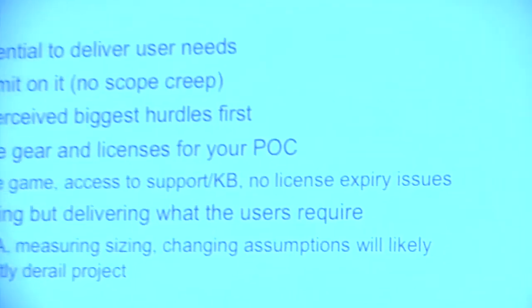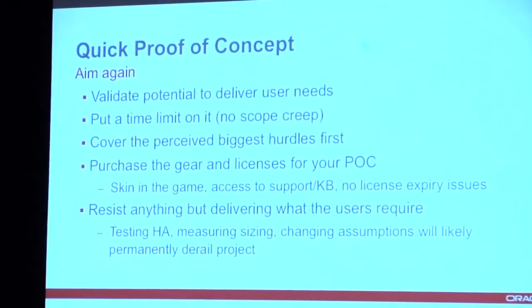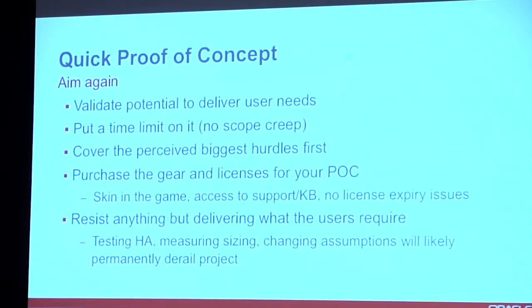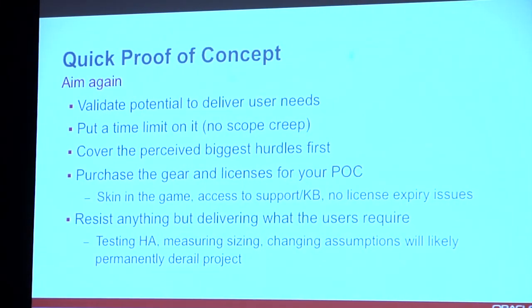So we're going to aim our second time, right? And so this is the hardest one for most people to do. They spend too much time in their proof of concepts. They spend too much time fiddling in their sandbox, turning the knobs, trying to understand what the boundaries of this thing will do. They spend too much time in here. So proof of concept, time frame is important. Put a time limit on it, in order to cover what you perceived ahead of time are the biggest hurdles. Some of the small hurdles and some of the things that may not be the key drivers, you don't necessarily need to cover those in your proof of concept.